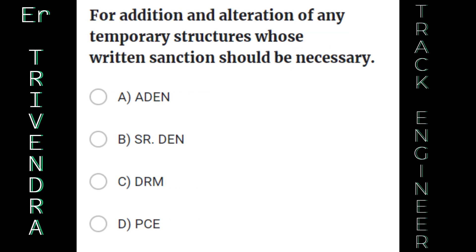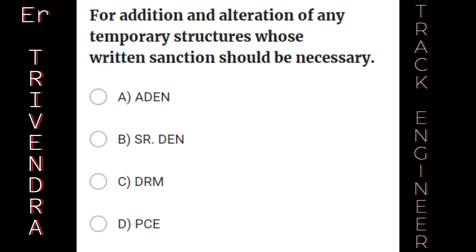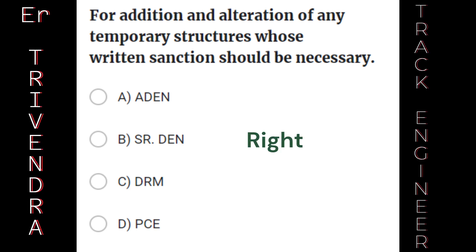For addition and alteration of any temporary structures, whose written sanction should be necessary? A. AEN. B. Senior Divisional Engineer. C. Divisional Railway Manager. D. Principal Chief Engineer. The right answer is: Senior Divisional Engineer.